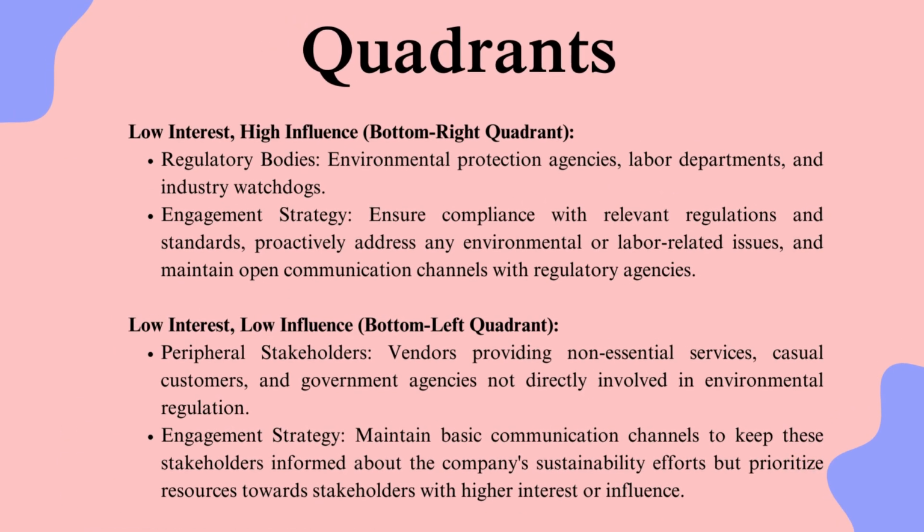Low interest, high influence means bottom right quadrant. Regulatory bodies are environmental protection agencies, labor departments, and industry watchdogs. Engagement strategy is to ensure compliance with relevant regulations and standards, proactively address any environmental or labor-related issues, and maintain open communication channels with regulatory agencies.